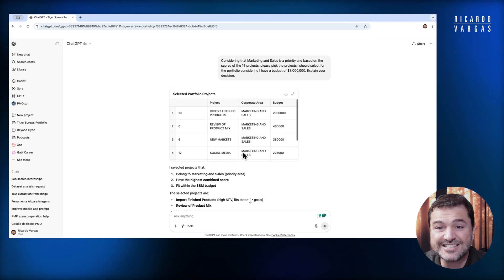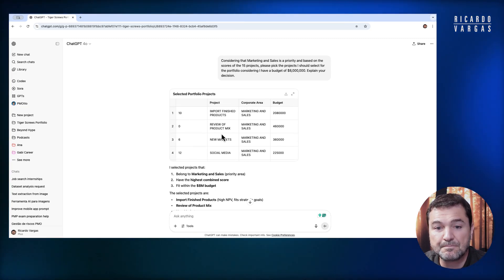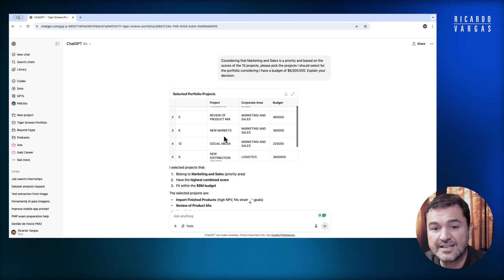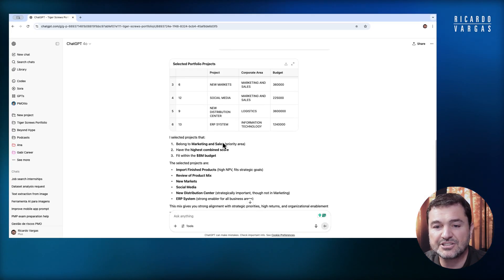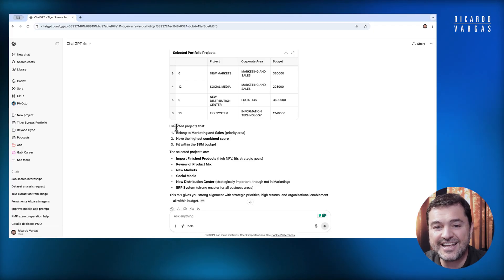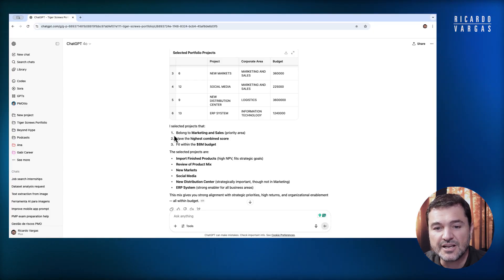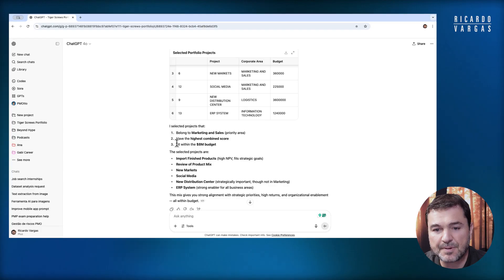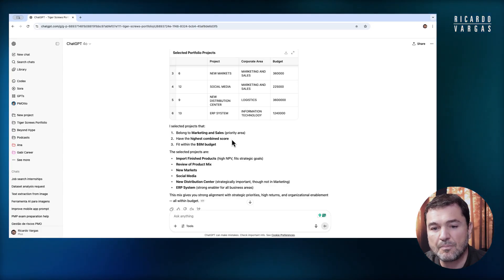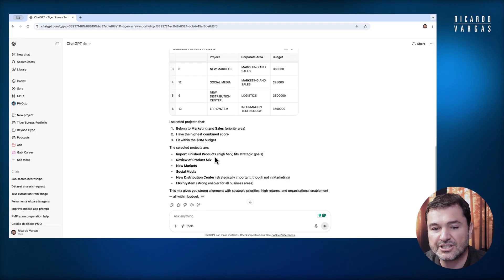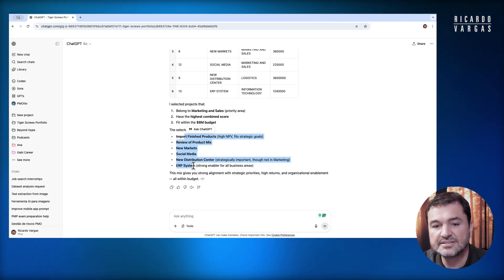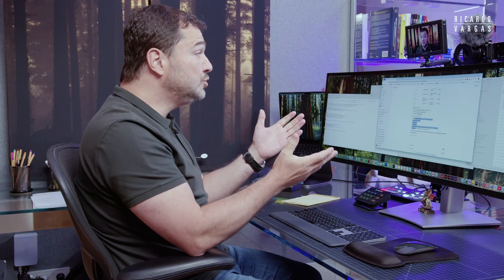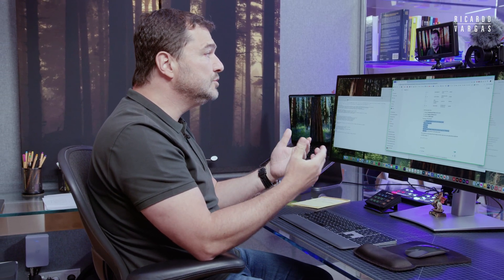Take a look. It's saying that I should do project 10, then project zero, then project six, project 12, project nine, project 13, and here's the explanation: because they belong to marketing and sales as a priority and have the highest combined score and fit into the 8 million budget. I could do that in different ways. I could ask it to use one criteria, another criteria, or put weight on criteria.